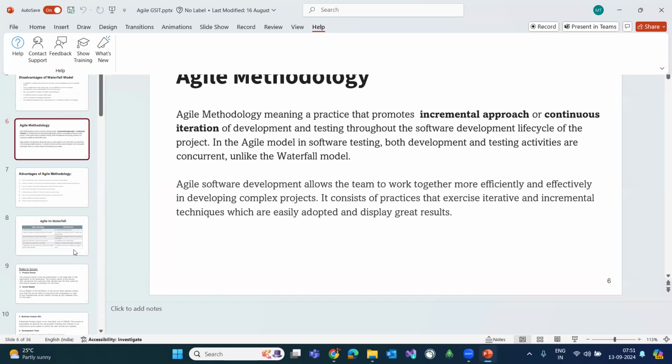Once the development team finishes, we will assign these two functionalities to the testing team and start executing the test scenarios. Now the development team will start working on the next one; we got the requirement for the feedback. They will start working on that, and we are working on the execution part. Like that, all the team will work together. Now this two testing part is completed, we will deliver it to the client. Now at least the client can start using these two functionalities instead of waiting.